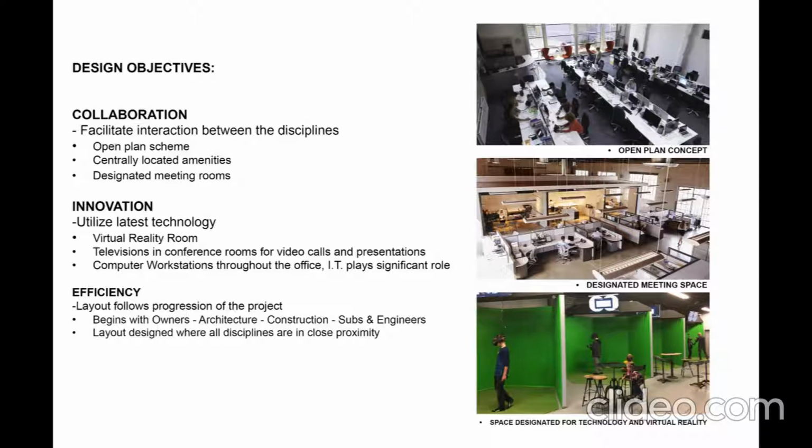Under innovation, we want this facility to benefit from the capabilities of the latest technology. We have a designated space for virtual reality. This was developed as a tool to facilitate walkthroughs of a project before it is even built, so that designers and contractors can identify potential issues before they become a problem. VR will also be a resource for clients to experience project design so they can make decisions early on, preventing changes later on in a project and maximizing efficiency. All meeting spaces and conference rooms will have televisions for video calls and presentations.